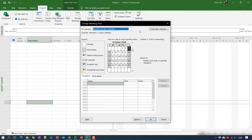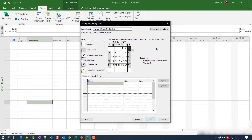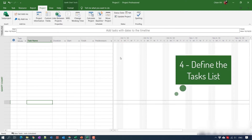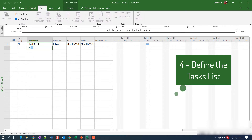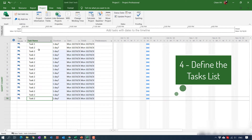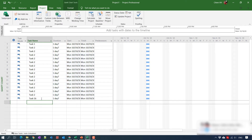Basically, just go ahead and click on the Create New Calendar button and then do some customization. The next part, number four, is to create all of the tasks for your project — for example, task one, task two, and so on. After you create all of the tasks, you should add the duration for your project. We should do that later on after we finish creating all of the tasks.